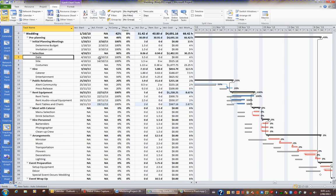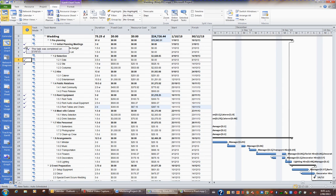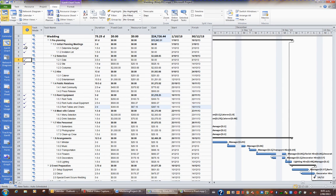The other thing I might point out is if you happen to go back to the Gantt chart in the View bar, you'll find that the Indicator column has put ticks in those tasks that are complete. And that's quite useful as well.